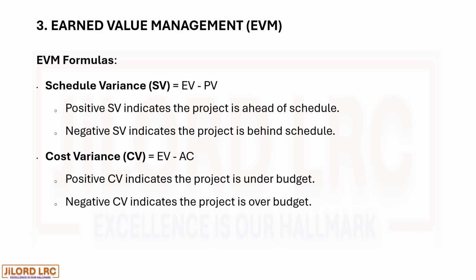If the cost you have incurred on the project is more than the value earned on the project at a certain data date, it suggests that your project is well above the budget.